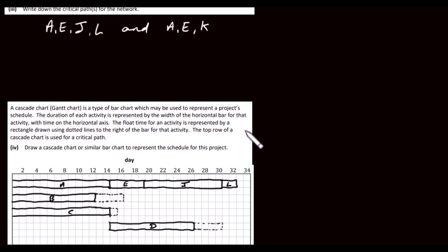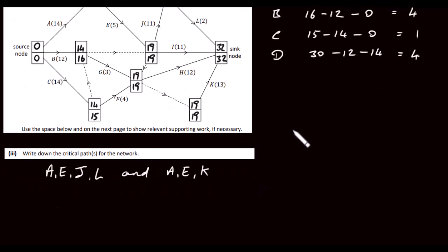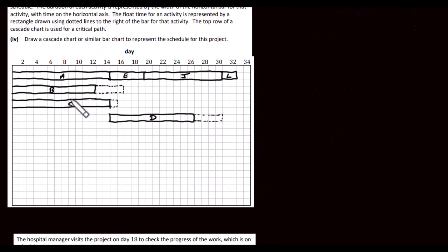So when does F start? Well, F is here, and that starts on day 14 and has a duration of 4 days. So 14 out to 4. Let's do that one. So 14 is here again. I'm going to go 4 squares. 1, 2, 3, 4.